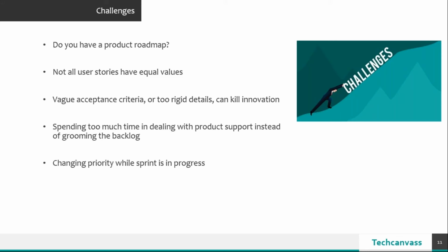So basically, in this case, we're talking about the edge cases. If you're working on one particular feature, it is not that every user story for that epic, or every user story within that feature, has to go live together, because there can be some edge case scenarios as well, which is good that you have highlighted or added into the backlog. But it's okay if you don't add them as a part of your MVP.